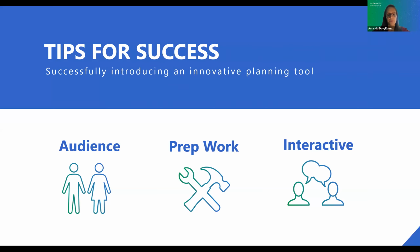Also, try not to put too much focus on the formatting during that process. You can always take some time post-session to do some cleanup and optimization of your NetPoint schedule. So focus on getting the activities, the durations, and the relationships in place, and then take a little time afterwards to fine-tune before you send anything out.